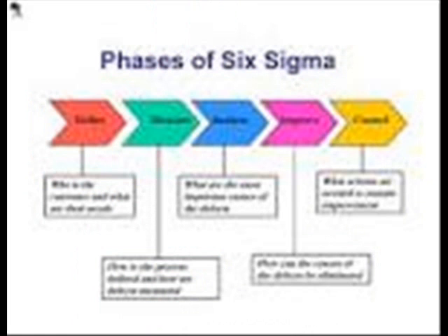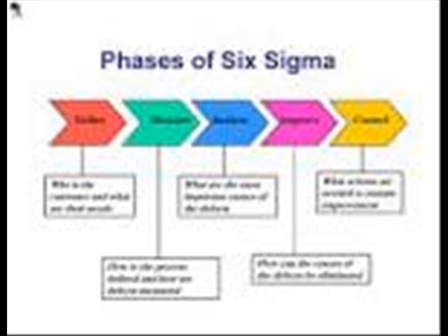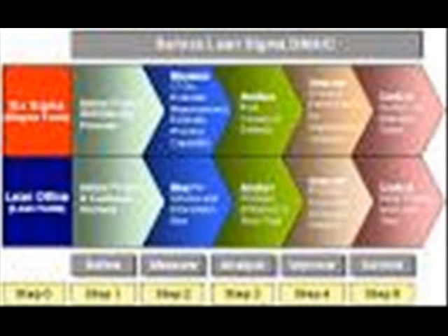The project definition would start with the first step, the definition of the problem statement and the business need. Here we are talking about the educational, operational need for doing the project. The second step would be defining the project scope. What are the areas which we will be covering in this study of the educational process? For this, preliminary data has to be analyzed, which usually means collected data, analyzed data and summarized data.